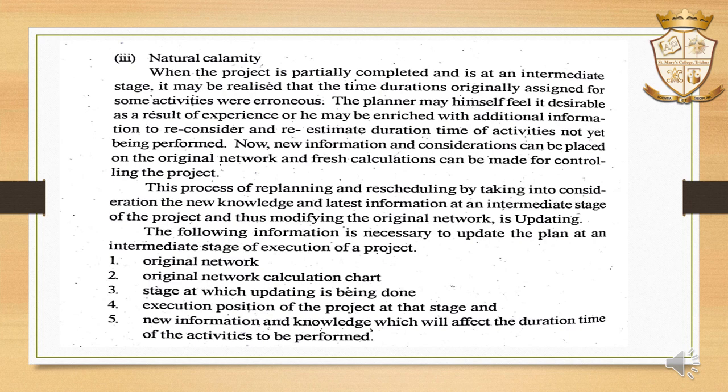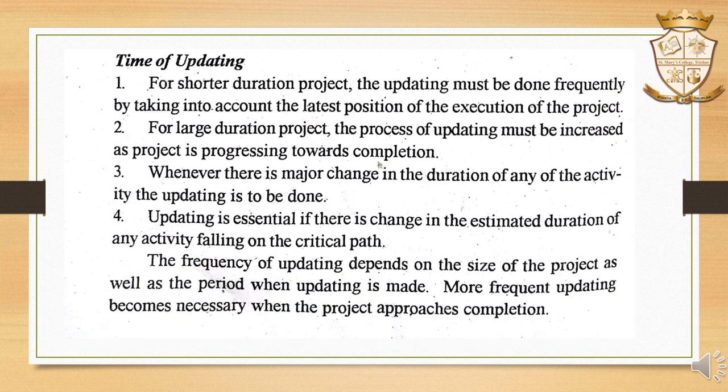Next is when we are updating a project activity. First, for a shorter duration project, the updating must be done frequently, taking into account the latest position of the execution of the project. And for a large duration project, the frequency of updating must be increased as the project progresses towards completion.